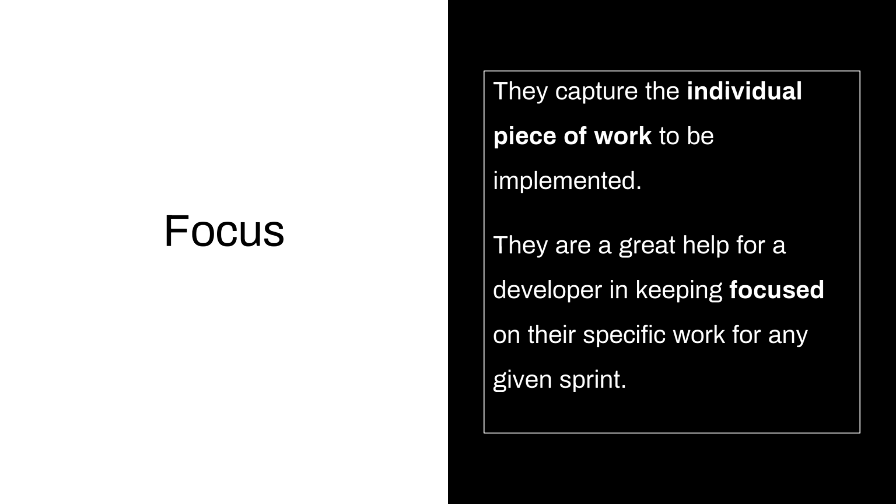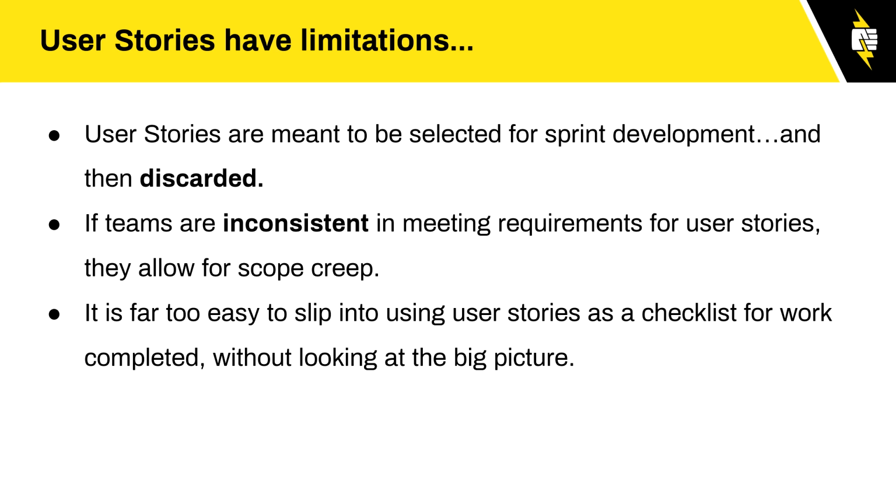I tend to be one of those people that just multitasks all day, and it was fantastic to just have this thing and say, this is my task, this is what I'm working on, this thing right here has to be done in this period, that for us was the day. We had to pick stories for the day, and they had to be done at the end of the day. So it helps you focus on the piece of work to be implemented, which then helps with scope creep too, obviously.